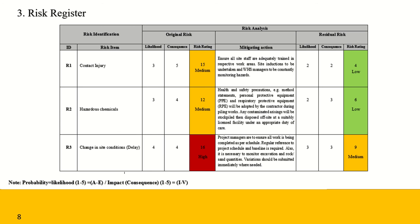Mitigation actions are pre-planned and coordinated actions designed to reduce or minimize the short- and long-term impacts. For each risk item, an appropriate mitigation action is provided. As a case in point, for contact injury, training stops and site induction are proposed. These mitigation actions are designed to reduce the risk rating of the project. By implementing the mitigation plan, the risk rating for contact injuries was reduced from 15 to 4.